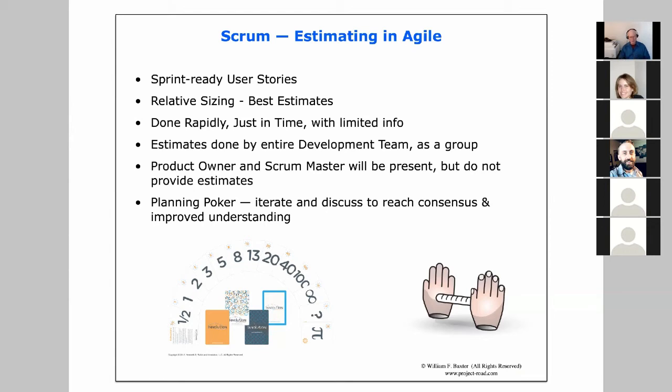And then as we complete user stories that were sized a 3 and a 13 and a 20, whatever, we realize we completed, for example, 22 story points this sprint. We completed 17 points this next sprint. We completed 27 points the sprint after that. We start to build up data on how many story points we're completing per sprint. They're very rough qualitative estimates, but over time they start to take on a little bit of meaning, and they become good enough to do some very rough approximations to help us ballpark when the next release might be ready.